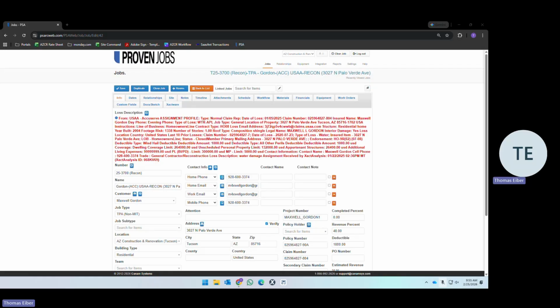Daily, you'll be required to check in with outstanding and unresponsive jobs, anybody you're not able to schedule a pre-con with, anybody who is, we've scheduled the work for and they are unresponsive. We need to daily check in with those to keep those moving. After a certain amount of time, you can determine that they are totally unresponsive and we can close the job. But daily, we need to be checking in until we determine that.